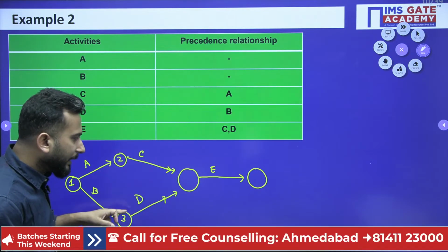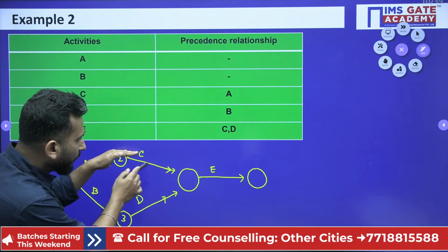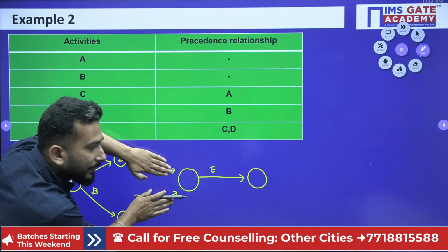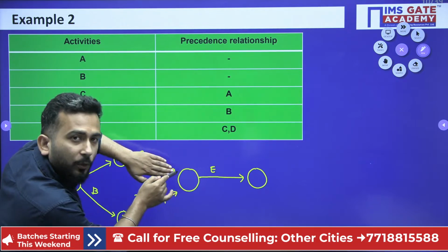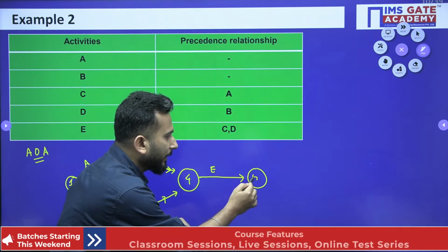Whenever I have numbered them, I will delete the outgoing arrows from there. So, these 2 arrows are there. I am deleting this. What is left? This is left. No incoming arrows. I am numbering it as 4 and eventually I am numbering it as 5.